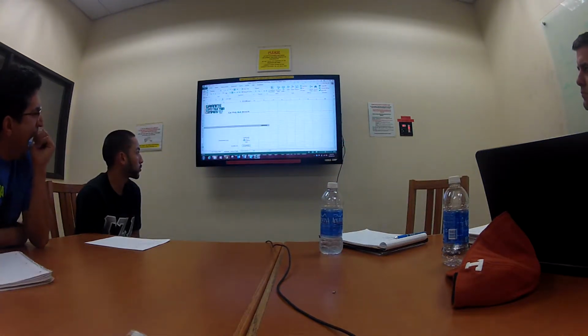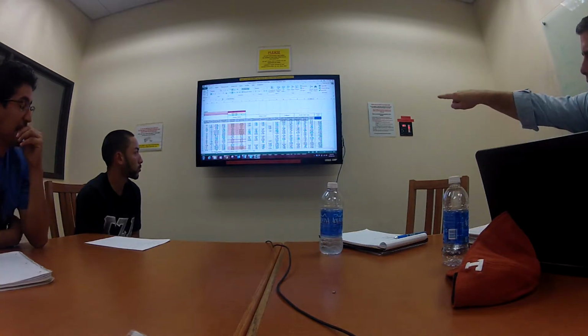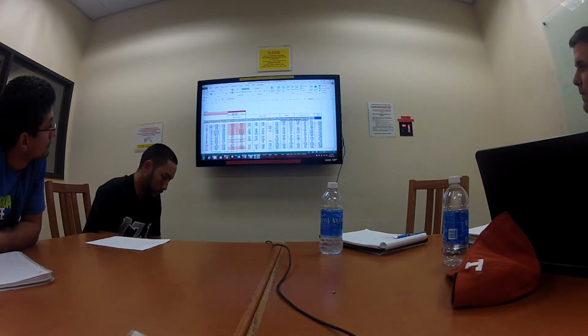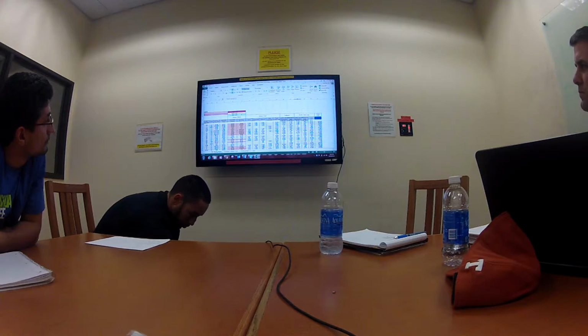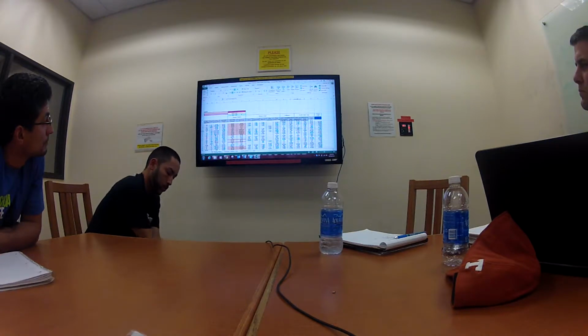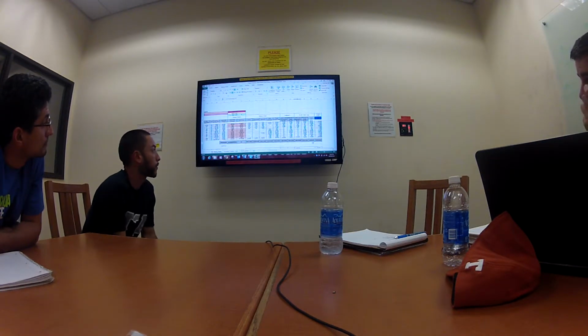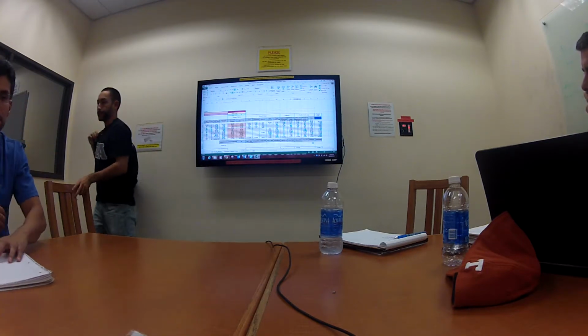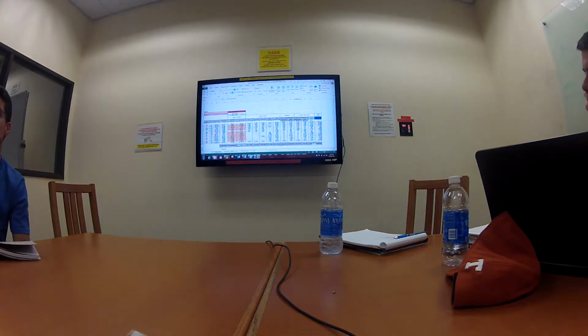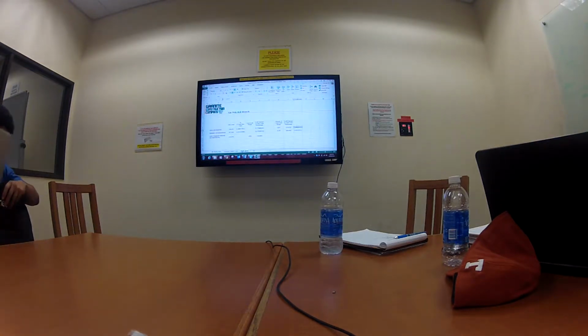Can we go over real quick again how 48 and 22.6 turn into 35%? Yeah. If you take all of the numbers underneath the 35% and add those up and divide those by the indirect cost and the direct cost together, it's going to equal 35%. That's because they say mark your job up 35%. Go to the profit spread. That one will explain it to you.